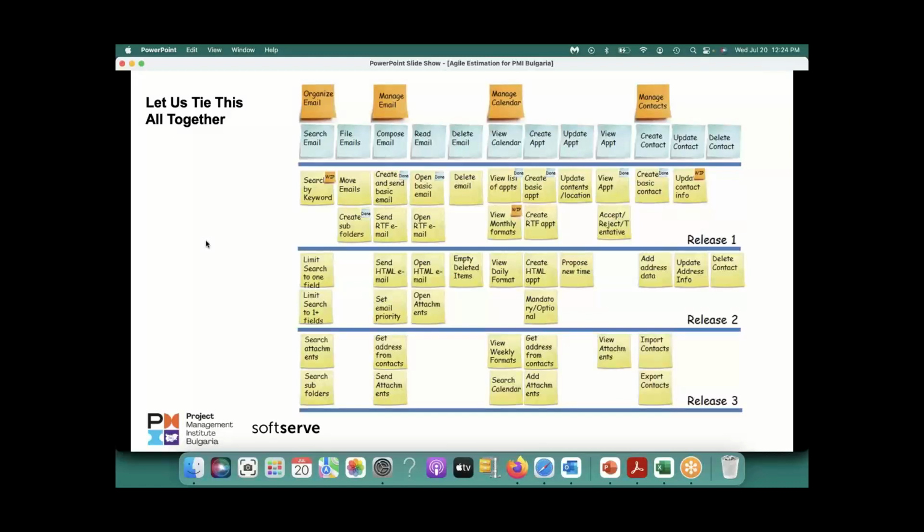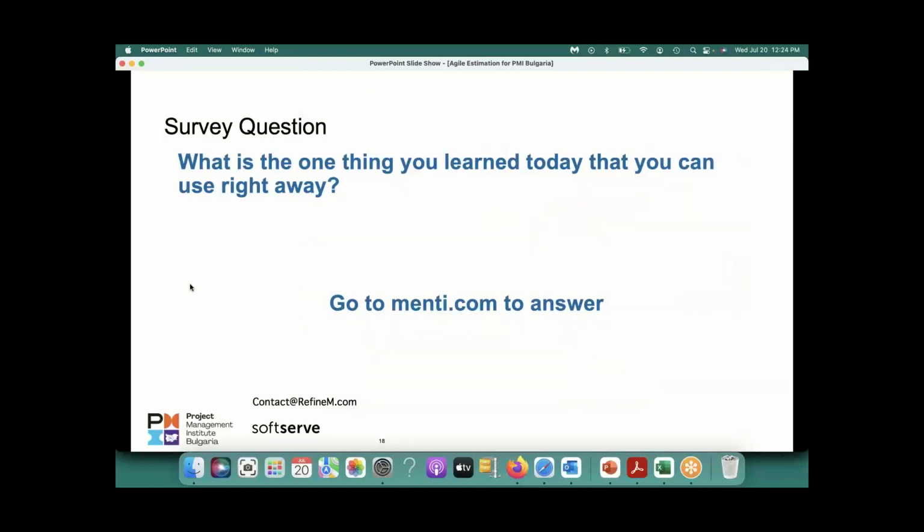And then the next level will be, of course, the sprint level planning, the absolute task level, which I have not mentioned here. So this level is product level, this is release level, and then the next is your sprint level or task level. And you use it at different times as things unfold. You don't have to do everything upfront. All right, so let's move on, and I will take questions at the end.